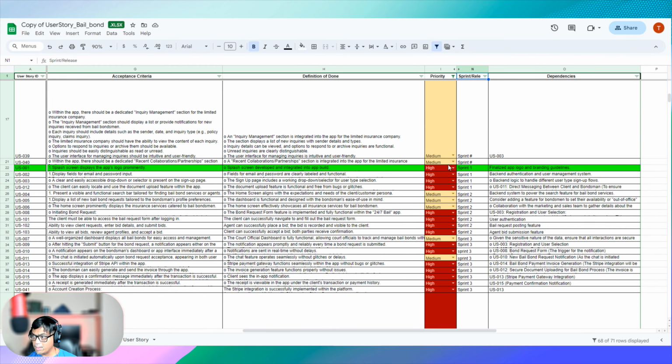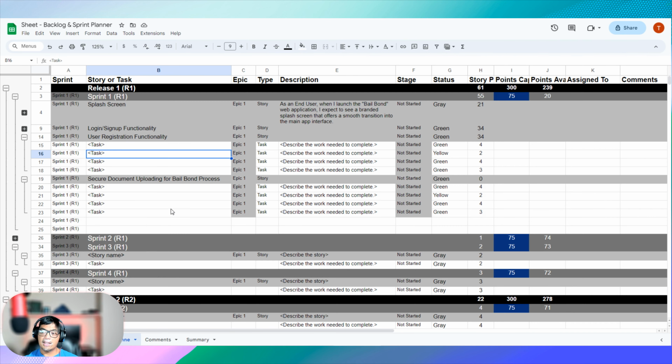And that's what I want to be able to do, is that everybody takes a certain sprint and just builds out the sprint on this sheet here. And then what that's going to do is, come Monday on the 20th, we're going to have a project kickoff, and that's where we're going to provide the developers the things that we want to complete based on this, and then they'll give us the estimate. This is the initial sprint planning with the developers, making sure that we understand everything and what we're looking for during this phase of the project.